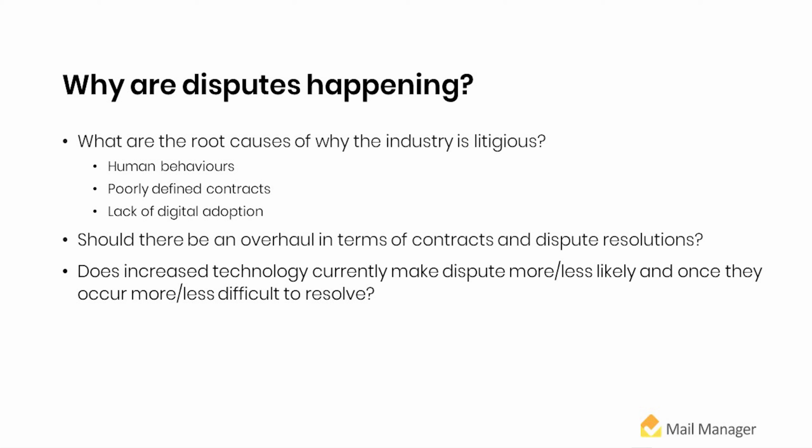However, what helps you in terms of making your case to the other side, so you don't spend years and millions of pounds trying to prove that you're right, is having the right records. So you can say, well, this happened at this stage and we agreed this. I've, over the last 17 years of being a construction lawyer, seen so many instances where clients have said, well, I'm sure we talked about this 5 years ago and this was agreed, but I just have to find the email or the meeting note or whatever it is, and then spend 2 months trying to look for that.